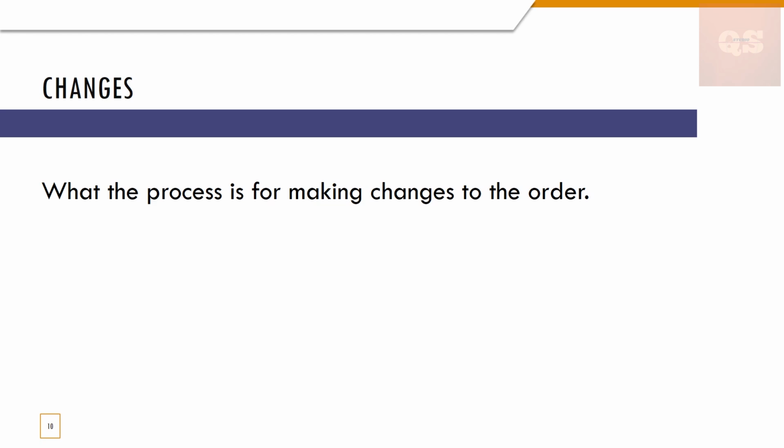the order? Because sometimes, if you finalize a particular model, and it is some material that needs manufacturing in a factory, they would have started the manufacturing process, so a lot of cost would have been incurred. So if you suddenly say no, you don't need that, you need another material, another model, then again there will be a lot of cost related to that. All those things should be made clear.